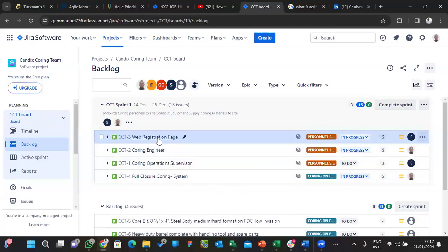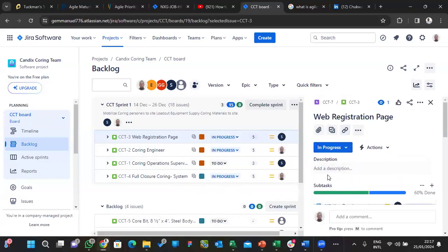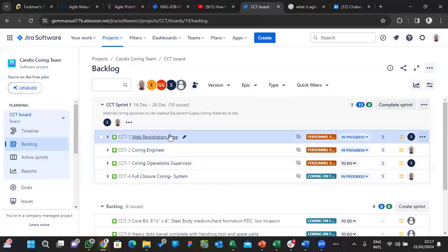Now, all of them will go to planning poker and, based on their previous experience, they open this card and see the volume of work here, the acceptance criteria and everything. They will look at what we have worked on before and say, I think we can go with 3. A lot of people maybe agreed to give it 3 story points. You assign it here as a user story, but that doesn't say it is the time it will take them to complete this user story. It's actually the vote, they're just estimating based on the complexity that is involved to deliver this user story, right?